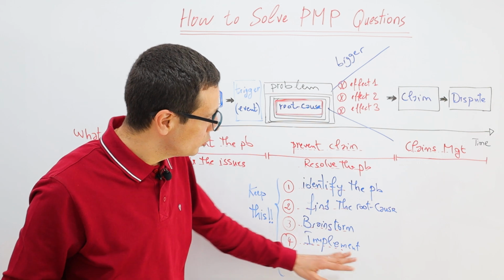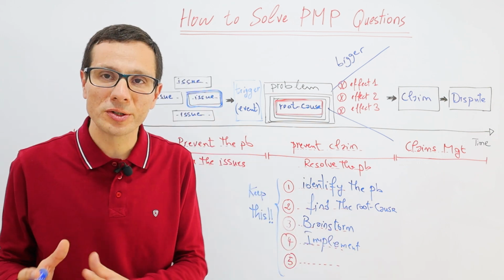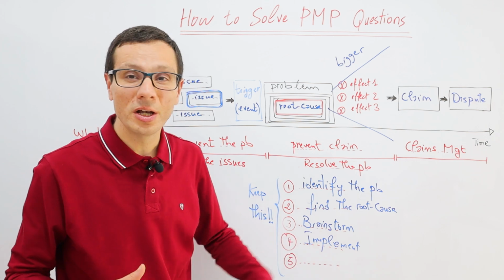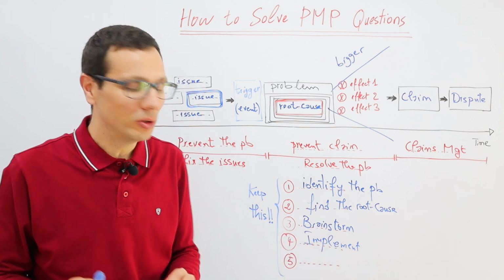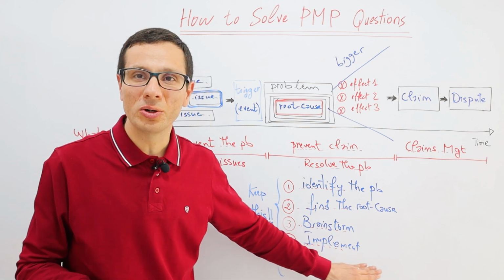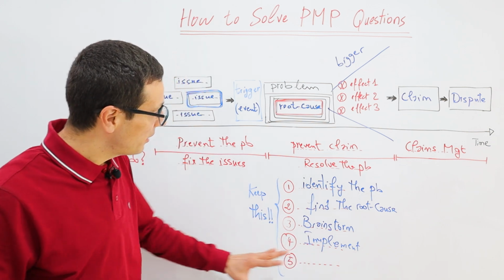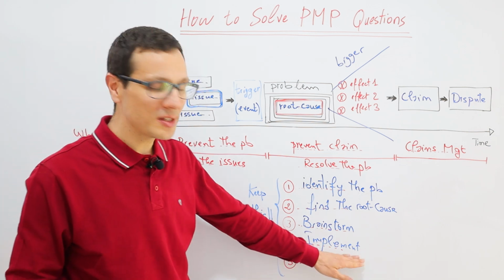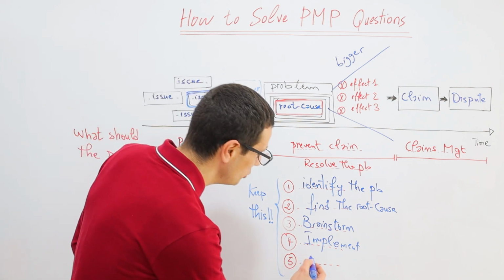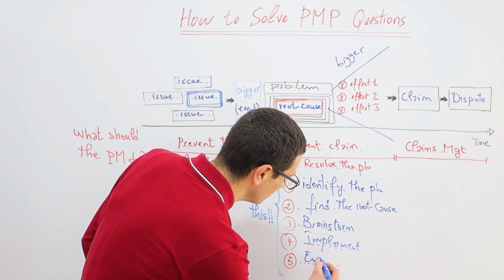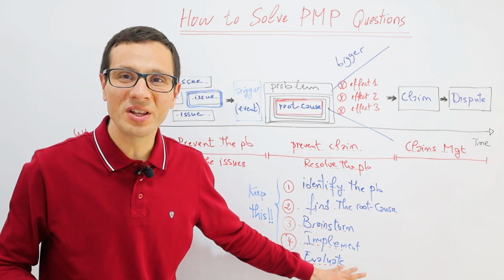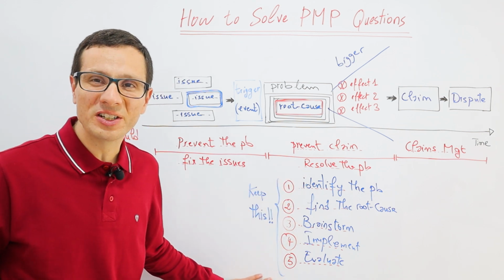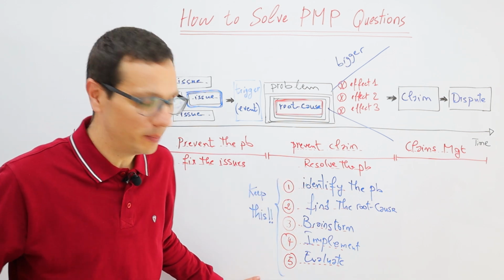the right one. And usually in this step, you also consult with key stakeholders and get their approval in order to implement the corrective actions. And finally, after implementing the corrective actions, you don't stop here. You keep reviewing and evaluating the impact of the solution that you implemented. And this is usually the workflow for resolving any kind of problem.